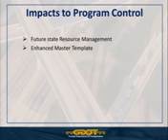Once we do go live and have the existing projects migrated over as they are, we will work with the design group managers and the project managers, almost on a project by project basis, on whether we need to add these additional activities into the existing projects. We were thinking at one time we may be able to do a lot of that globally, but that's probably not going to work because each project has been approved and given durations, and the templates we have are just standard durations. So we'll work with the design group managers and PMs to get that done, and any new projects that move forward after we go live will be using the new master template that will have these additional activities.